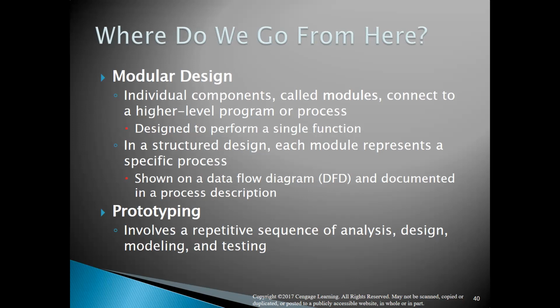and you pick up all the errors that you made, and then you work on the second one. When you work on the second one, you know what things went wrong, what lessons you have learned, and according to the lessons learned, you design the second module effectively. That will make it a faster process, rather than making all 15 together at once, and then having a lot of issues later on.